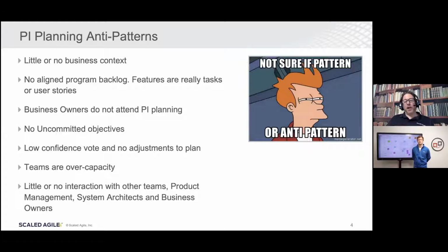Not having an aligned program backlog is a real problem. I often see that organizations are planning stories, but not features. So you really can't see the big picture if you've got all these hundreds of stories.